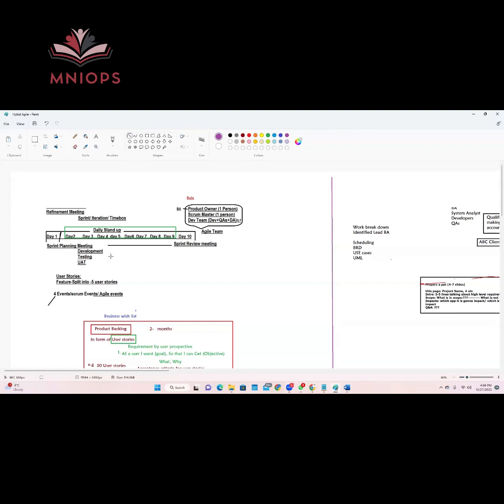These 10 days, whatever the team takes up, that we will do this feature, to make sure the team will have everything to build that feature, and protect the team from any external influences, and also, if the team encounters any roadblock, work on that roadblock and all those risks, so the team will have a safe and smooth environment to do the development and testing and make the product shippable ready by day 10 of the sprint. Okay, so whatever feature the team committed to is shippable ready by day 10 of the sprint.